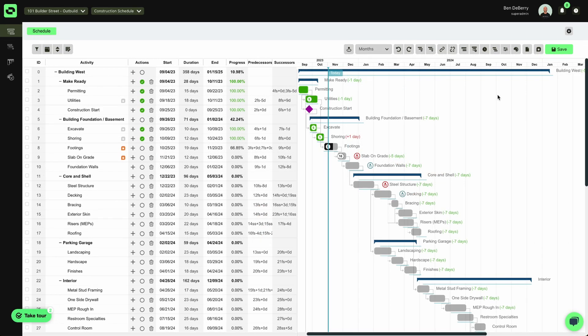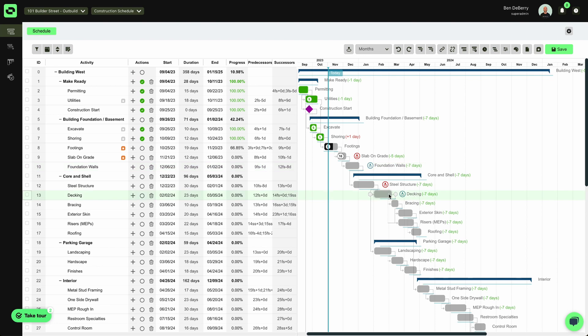Now, after I fully built my schedule, it can look something like this. I can see my list of activities, I can see each group, I can see if I have connected submittals through Procore, I have my saved baselines. So it shows us if we're ahead or behind schedule.